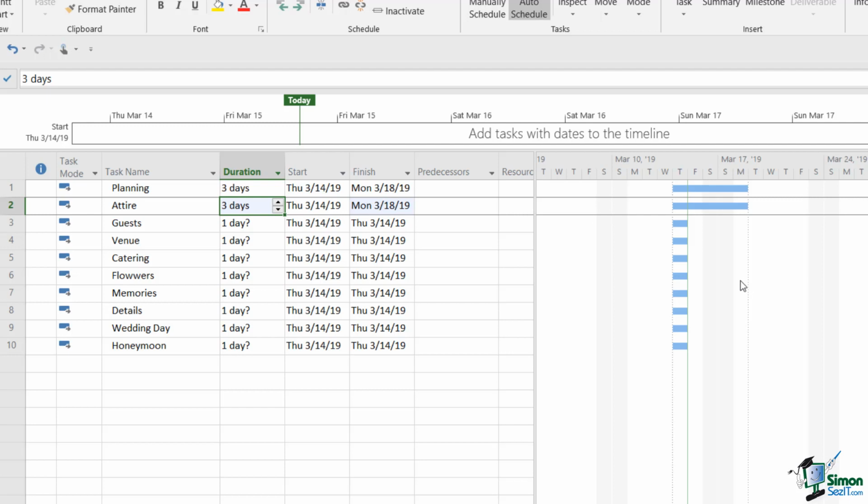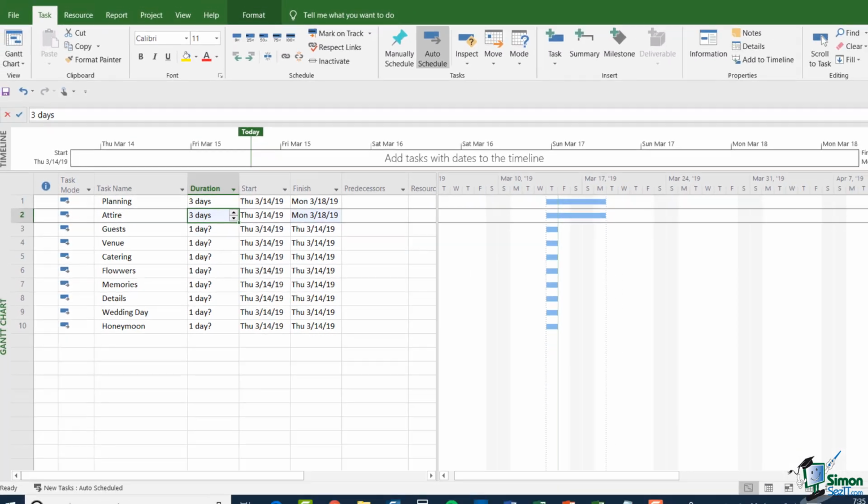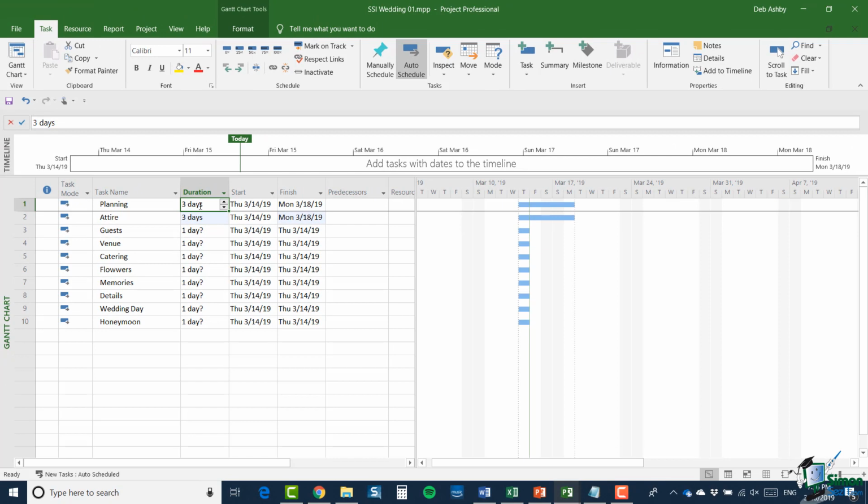And we've talked about the project start date. Supposing I was entering this project and in fact the various aspects of it had started a couple of weeks ago, I'm a bit late setting this project up in Project 2019. So some of these things may have already happened. What I could do is change the project start date. So look, for example, at that first planning task, which says it starts on March the 14th. So that's the date that I entered it yesterday, and that is currently the start date for this project.